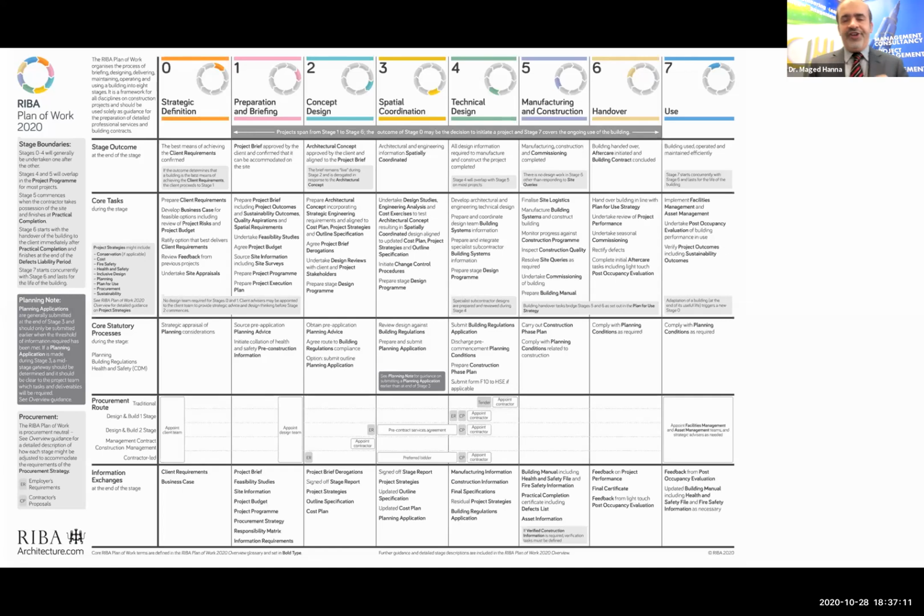Again, this is another one of the most common failures I see in a lot of projects, causing the design to fail. A lot of designers, once they get awarded a project, start doing the design, ignoring the authority's requirement, not going to the site to inspect. And that is causing a lot of changes in the design. In some projects I see 15 versions of the architecture drawings, 20 versions of the civil and structure drawings, 30 versions of MEP drawings. And why is that all happening? That is all impacting our success and also the client's success.